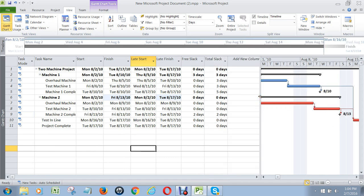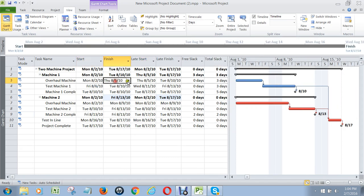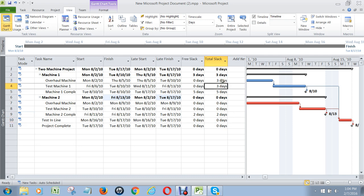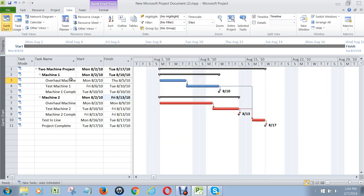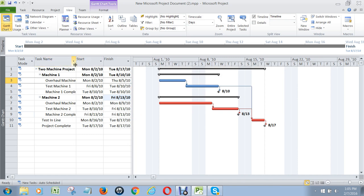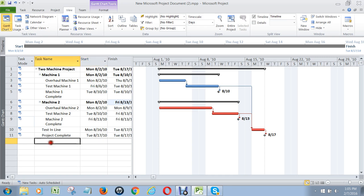There's one other view that's kind of nice: View, Table, Schedule. What this does is give you the early start, the early finish, the late start, and the late finish of every task and whether there's any slack. Slack refers to how much an activity can be late before it will delay the project. All of these tasks that have zero on them are critical tasks and they're going to be in red — if they're late, the whole project's late. If any tasks have a number here, it means they can be delayed that much. In this case, Overhaul Machine 1 can be delayed three days without delaying the entire path. I will often just give this section in a screenshot to a project team — I never give them the late start and late finish or else they'll use it because they don't get it done on time. But if I just give them this, that can be a way of presenting your project to others. More on that in video 3, which is how to actually display the project to other people.